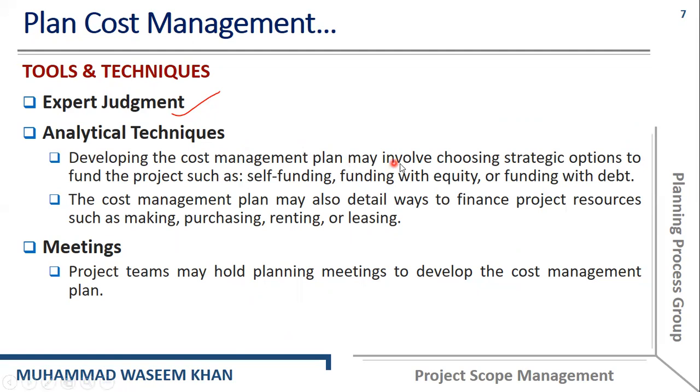developing the cost management plan may involve choosing strategic options to fund a project, such as self-funding, funding with equity, or funding with debt. The cost management plan may also detail ways to finance the project resources, such as making, purchasing, renting, and leasing. So for these different processes, we use some analytical techniques, and we have discussed some analytical techniques previously, and some of them will be discussed in the coming lectures.